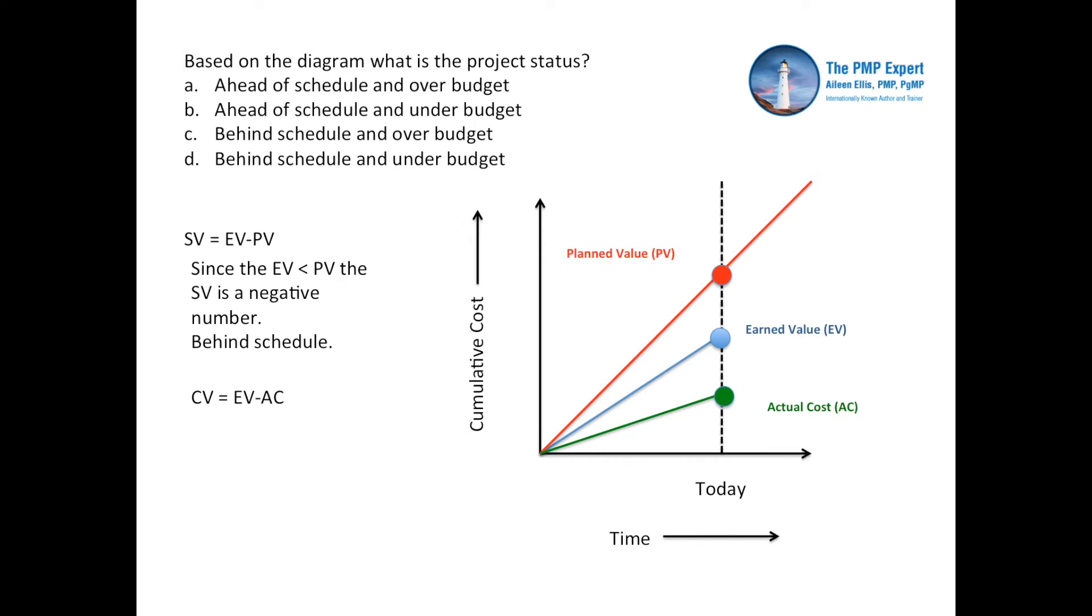Let's now think about cost variance. Cost variance equals EV minus AC. When we look at the diagram, we can see that the EV is greater than the AC. This means that the cost variance is a positive number. Positive numbers are good in the earned value system. This means we are under budget.